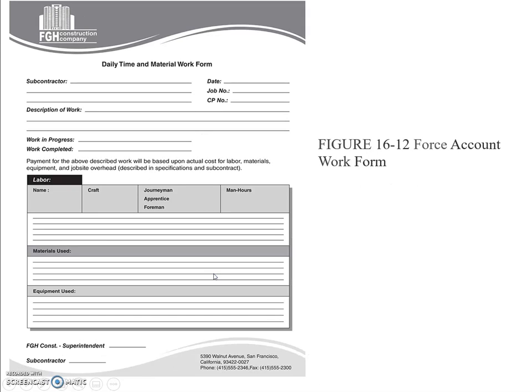When using a unit price or a cost plus determination of the change order price, measurement procedures are necessary. Unit price determination may require a verification of the unit affected, such as a truck count verified by the owner's inspector. Daily work reports listing labor hours and material received may be required for cost plus changes.